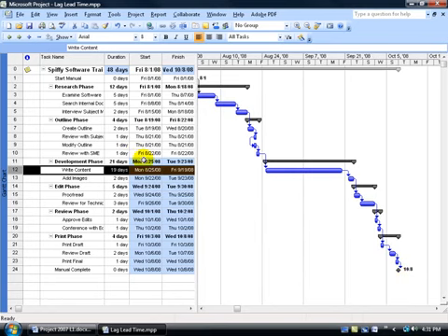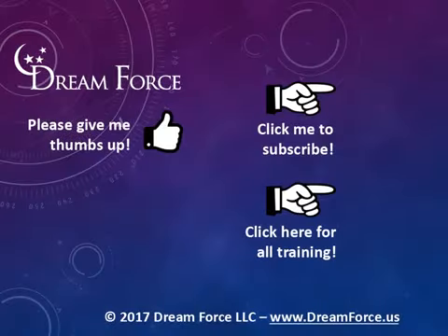Now I've got all the flexibility. I throw resources up here, these tasks are down below. It'll bring them in. The more workers I add, the sooner we can complete it and not have those constraint dates. Again, only use a constraint if it's absolutely necessary, and as a good example, if you're not going to get funding by a certain date or have workers available by a specific date, then obviously it would make sense to have a constraint. Thanks for watching.